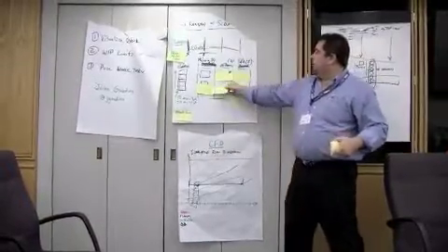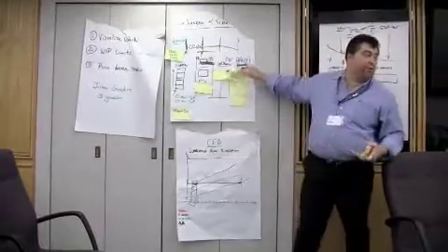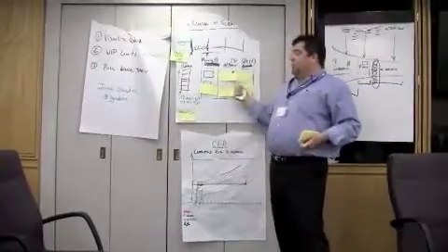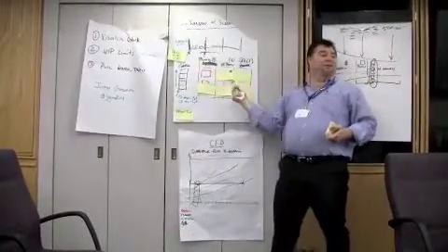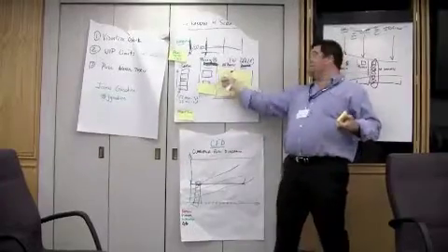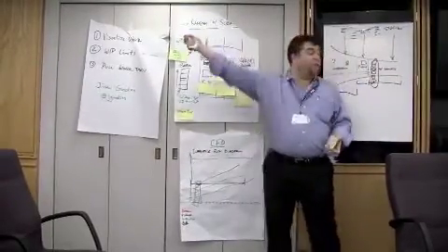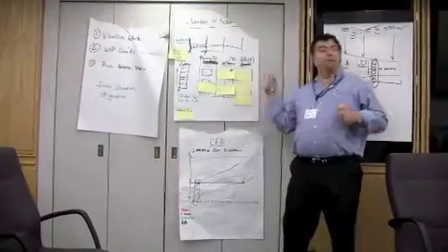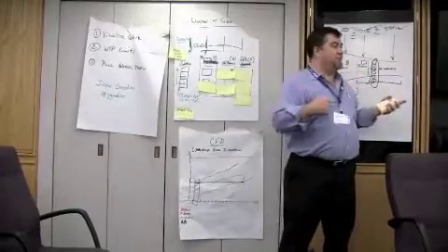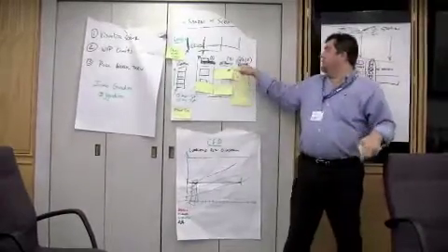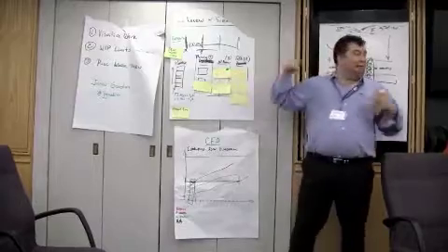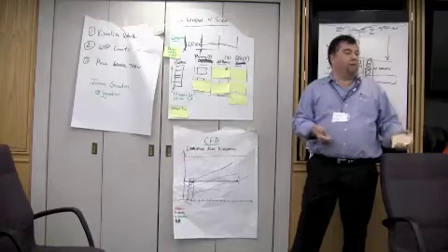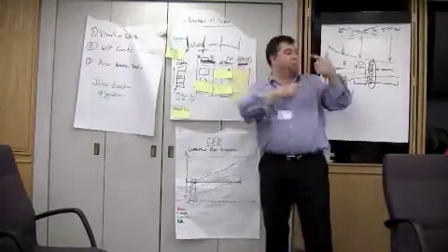In the Kanban world, I don't get to push it down to QA. There's a limit of 3 and I don't push. QA pulls. So here I am. I don't push, I pull. I want to pull another card in to work on. I'm done with all the work here. This work needs to go downstream, but it can't. I want another card. What am I going to do? This starts a serious behavioral change with teams right here, what the work and process limits do. I can't work on something new. Guess what? I have to go down and help out the QA people for a while. I got to be a bit of a tester. I can't just be John Coder all day. That starts to force people to work cross-functionally.